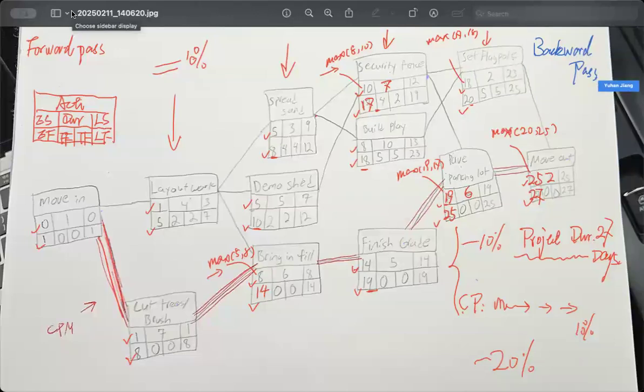Okay, so the backward pass is starting from here. You have your project duration statement coming here. So you have 27, and the -2, you get a 25. So those are correct. So 25, you are looking for the next one.